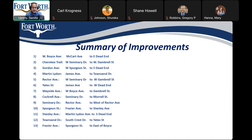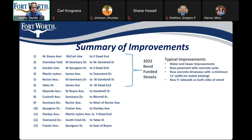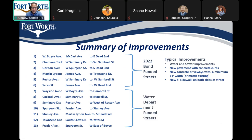The streets in this list are divided into two groups based on the funding source for improvements. Streets number 1 to 6 are 2022 bond-funded streets. For typical bond-funded streets, in addition to water and sewer improvements, the pavement improvements include new pavement with concrete curbs. We will also be replacing concrete driveways with a minimum 11-foot width or match the existing. Sidewalks on both sides of the street will also be constructed.